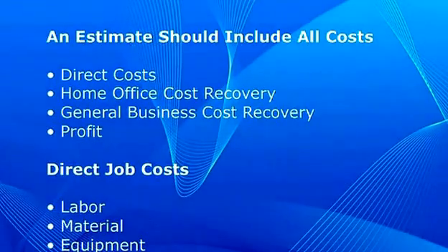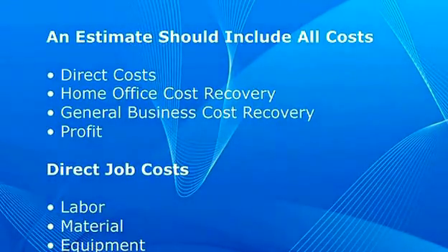Very important, very tough lesson that young companies, young estimators learn is what you write, your hourly rate, your $24.93 for a 310 laborer right now, isn't what a 310 laborer costs. So we've done a very good job of talking about recovery, cost recovery, overhead recovery, home office recovery, and I've